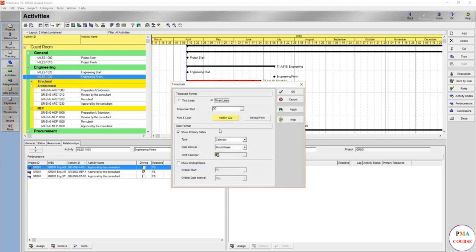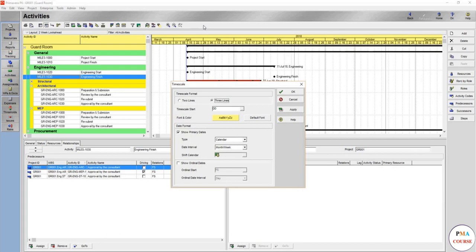So go back to the time scale. What's this show ordinal dates? For example, you're in the tender stage and making a claim, or you're using it just to show that this project needs this amount of months or weeks or days or years.